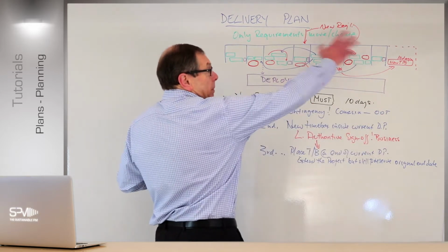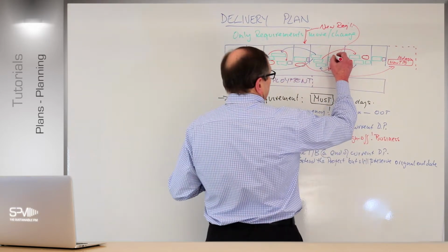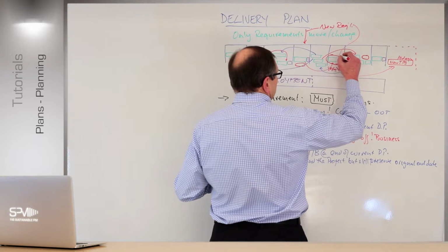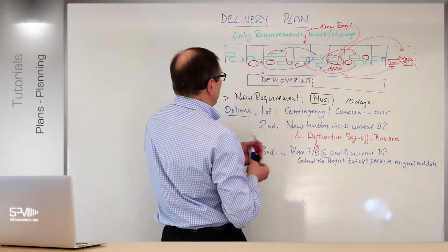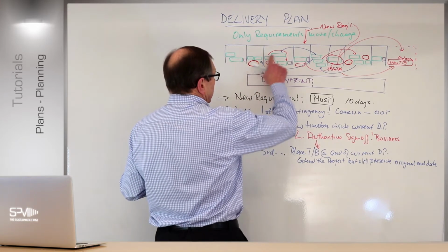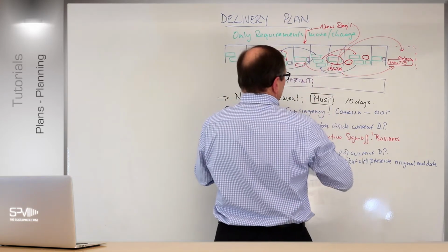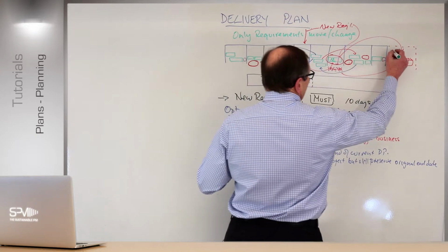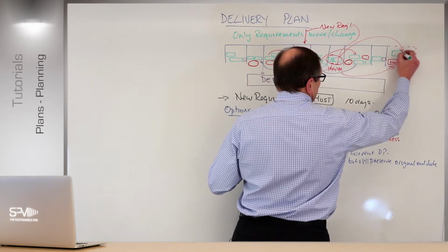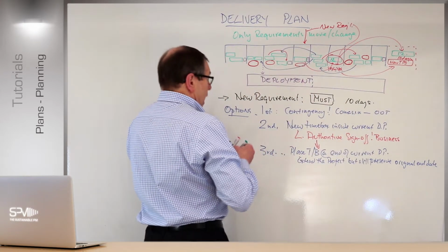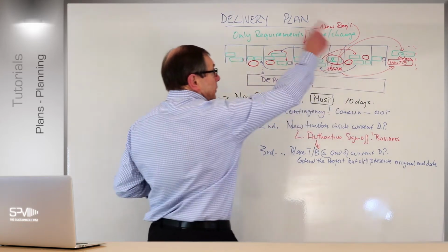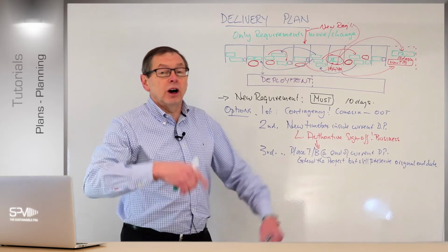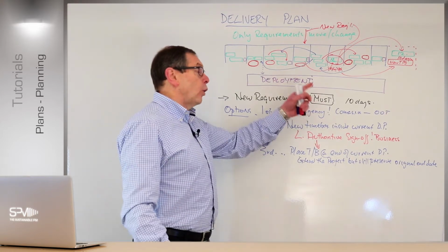So we could go back one step and take this time box and move that time box out here, right? So whatever time box it is, number 1, 2, 3, 4, 5, 6, 7, 8, 9, 10, 11, 12, that's time box 12, now comes in here instead, right? And we actually do the work we needed to do for the new requirement within that time, that increment, that time frame as it is. So that's the fourth option.